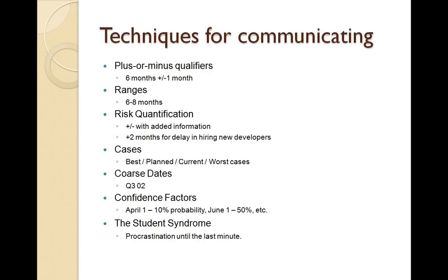on 1st of June. And another aspect is called student syndrome, which means procrastination until the last minute, which means preparing when the exams are coming up. So defer the estimations until they are required. If you see in Agile, we provide the high-level estimates initially, and we provide the low-level or task-level estimates only when the specific sprint or the duration of time is going to start. So we defer it until then.